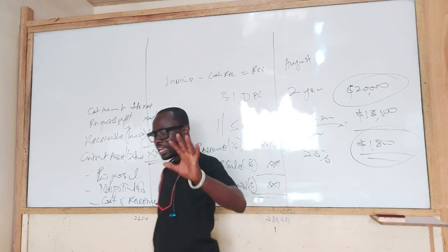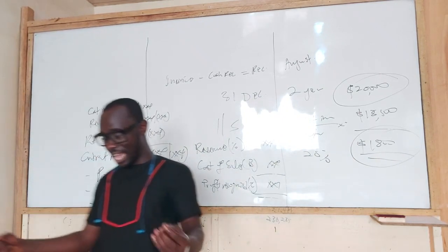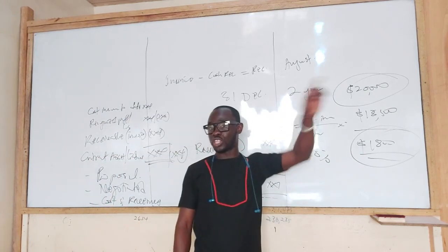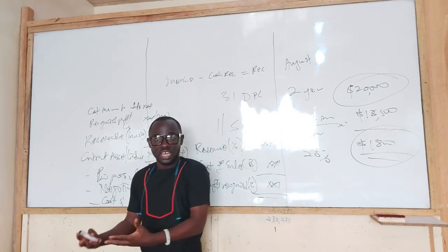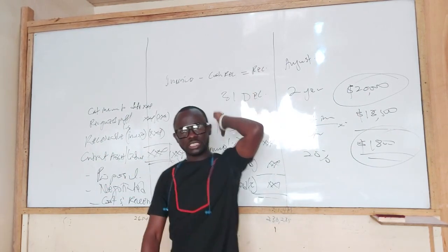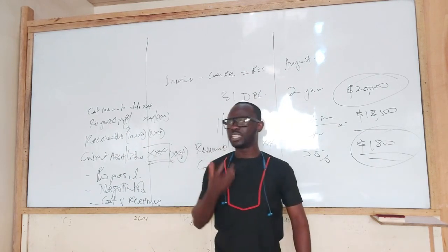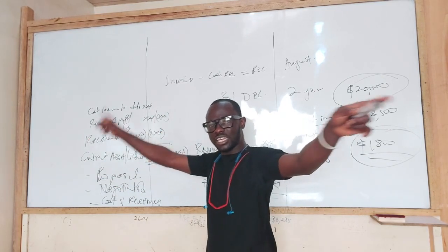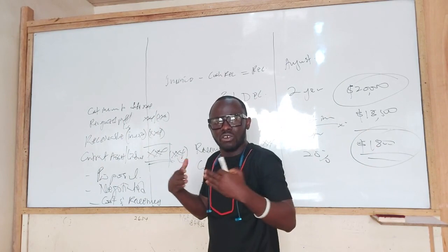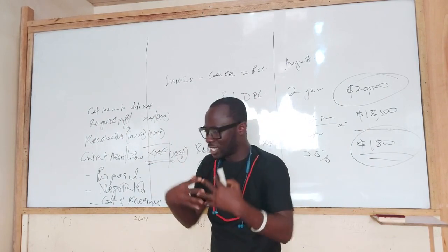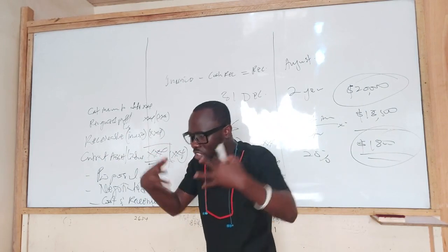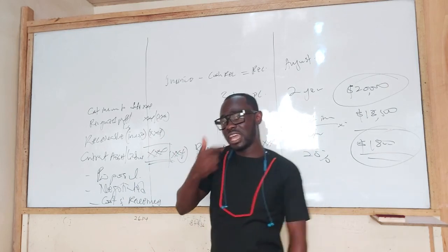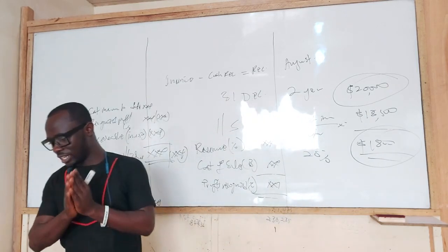Number one, the asset differs significantly in design, technology, or function from the asset or assets covered by the original contract. So if the asset differs, then it is separate. So we are constructing a hospital, then they said, oh, since you are in this town, why not construct some toilet facilities? Hospital toilet facilities, yeah, in the long term we can draw some correlation between them, but they are not related based on design, based on technology. So in that case, they have to be treated as a separate contract. But if they are related, then we will treat it as a single contract.